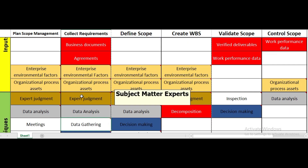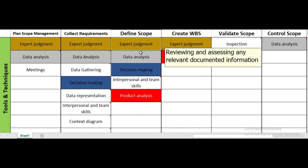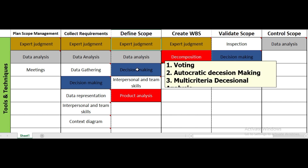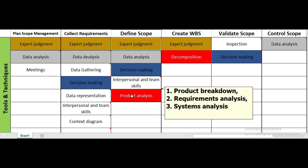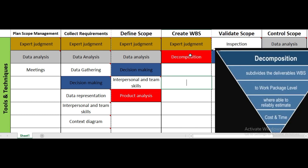In the define scope process, tools and techniques include expert judgment — to help define how the scope will be established — data analysis (reviewing and assessing relevant documented information), decision-making techniques such as voting or multi-criteria decision analysis, and interpersonal and team skills. Product analysis is a particularly important and unique tool here, which includes product breakdown structure, requirements analysis, and systems analysis.